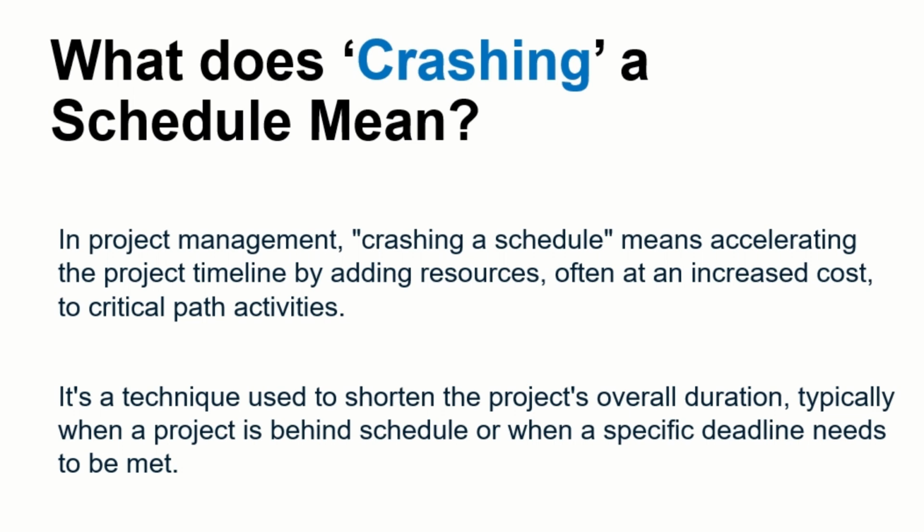In project management, crashing a schedule means accelerating the project timeline by adding resources, often at an increased cost, to critical path activities. It's a technique used to shorten the project's overall duration, typically when a project is behind schedule or when a specific deadline needs to be met.